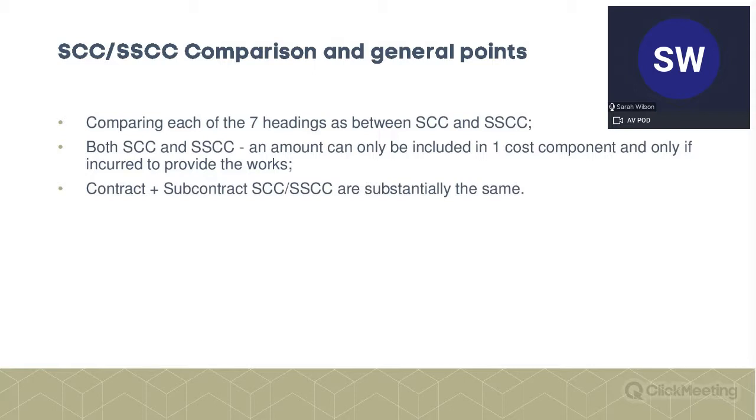I think this is also helpful, because what I've found is often claims will be submitted under the schedule or the shorter schedule, and the PM will delete one because it will say that's not claimable under that heading, it's claimable under another. I think the pragmatic thing to do is just claim it under the other heading.